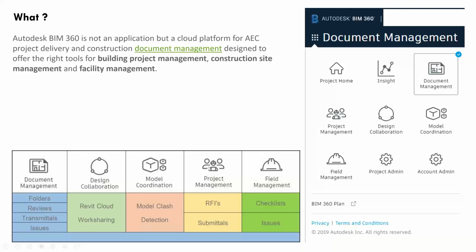all your files. Since all those platforms are connected together, every time you look at an RFI, you're going to be able to see the plan because all the documents are also on this platform. So if you create an RFI and you refer to a particular location on the plan, everybody is going to look always at the same plan. So that means you have what they call one source of truth. So nobody can remain in a version that's not up to date.